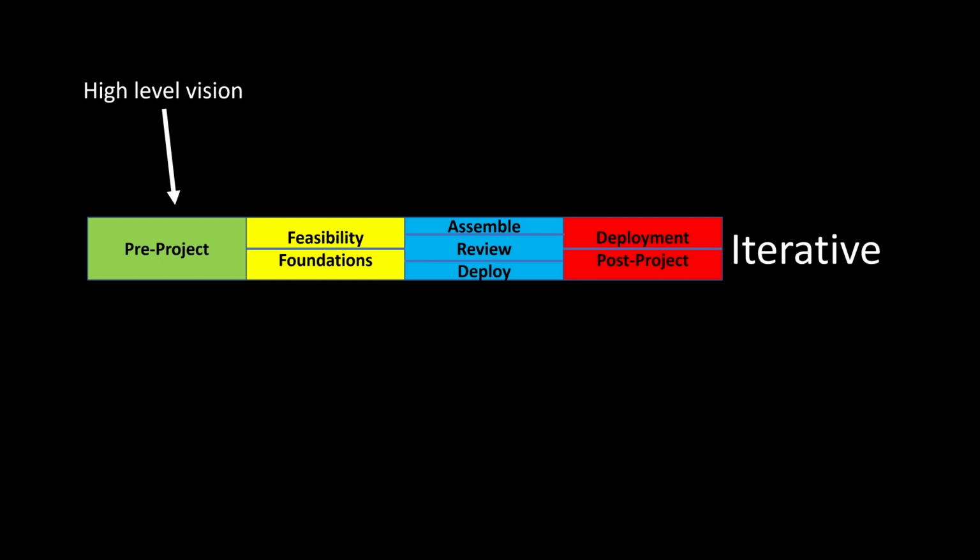If you know what you want to do and you've got a pretty good idea how to achieve it, linear life cycle is for you. If you know what you want to achieve, but you really don't have a clue how to go about it, how's that going to happen? Nobody's ever done this before, or your business has never done this before, and there's going to have to be some sort of research and development, some creative processes. You're expecting to try things and have them not work first time. An iterative process is going to be more useful.